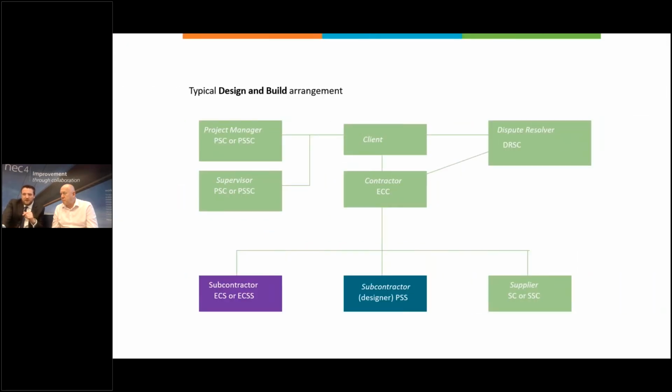There is something a little bit new here. We've moved that designing element under the contractor, and in NEC4 the PSS, the Professional Service Subcontract, uses the parties the contractor and the subcontractor. The thinking is that the contractor is more likely to use this Professional Service Subcontract form than perhaps a consultant is. So whereas it might have been considered consultant, subconsultant, we think contractor, subcontractor works better. And then, as before, the subcontractor under the ECS, for instance, delivers that part of the works.